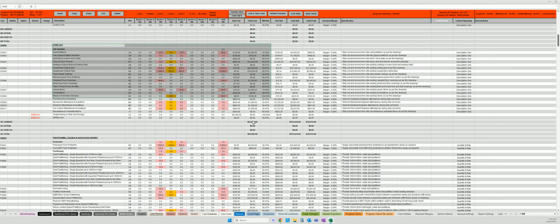So in this template, I'm now looking at strip out. I can analyze my cost above the line, my sell above the line, and I'm looking at this scenario and I'm going, well, our package is $63,000 on the cost side above the line. What if I can save maybe about 10% on that package? So I've created a line called target saving on strip out package. I'll put one quantity in to say I want to activate that stretch line.